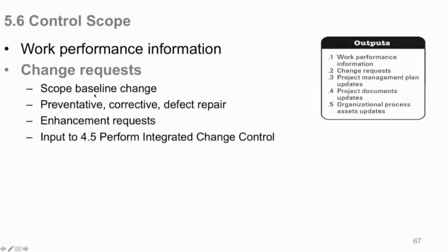You may need now to change your baseline because scope, I didn't want that. It's wrong. Why did you do that? Okay, well, money now is down the tube and everything else, so you may need to change your scope baseline if in fact maybe you did build something wrong, meaning not in the scope baseline, but maybe you're lucky. And the client says, hey, okay, I see why you did that. You shouldn't have done it without approval, but I'll take that. Good, you're lucky. But then you still need to change your baseline to include it in there.